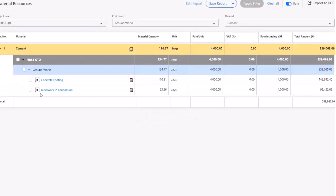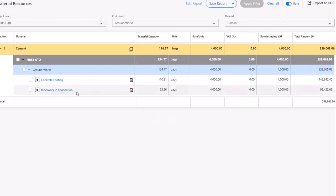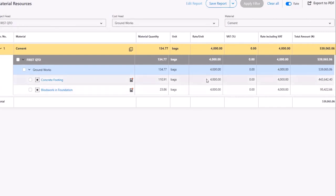It takes a few seconds and it shows you: for concrete footing, we are using 110.9 bags. For block work, we are making use of 23.6 bags of cement. And this is the current price of cement.